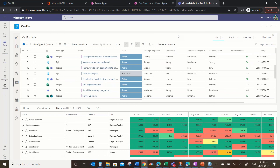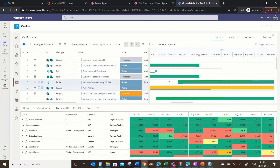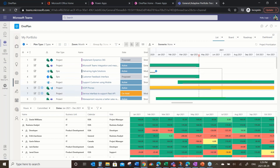I didn't solve all the problems here — that wasn't my intent in the demo — but I did start to look at: clearly we couldn't do it all, so we start unchecking some projects and seeing what is the impact if we say, let's not do that one now. I could also start moving projects around on the Gantt chart, dragging and dropping projects to see if that makes a difference as well. So I have multiple options here for how I might balance my resource pool — armed with all of the data captured in that resource plan grid — to inform both the resource management and portfolio management roles: what are we to do with this? When are we going to schedule it? Maybe we delay some things, defer some projects, or put them on hold to focus on higher-priority items based on available resources.